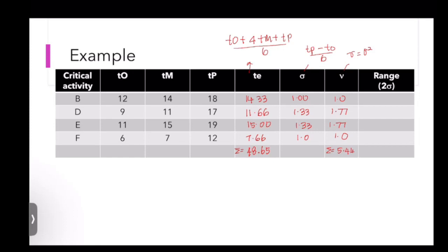Okay, from this value, we want to calculate first the probability the project could finish before day 47. So the deviation Z is TS minus TE divided by standard deviation. Okay, so now we have the variance for total expected time